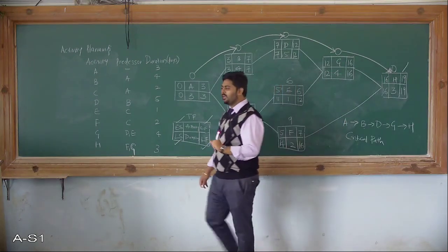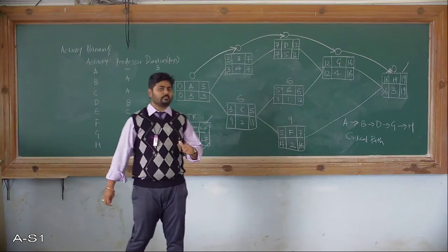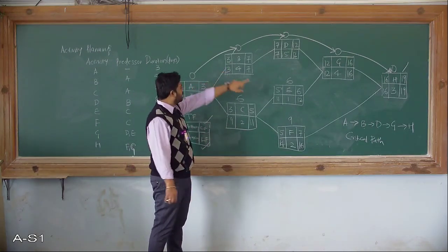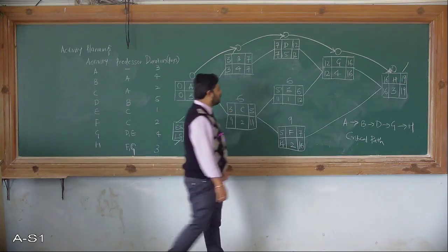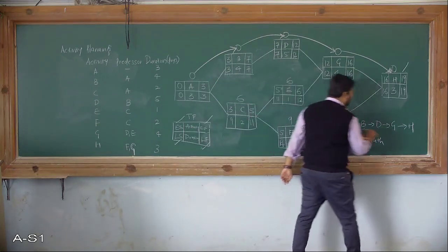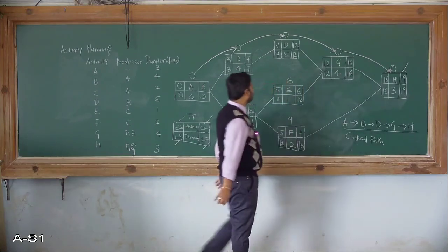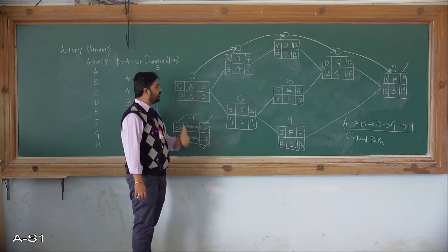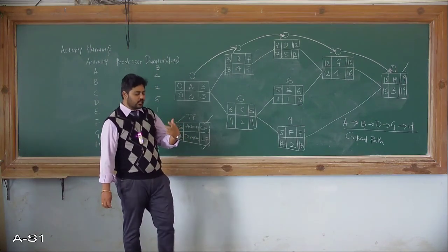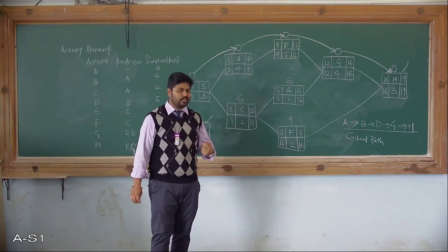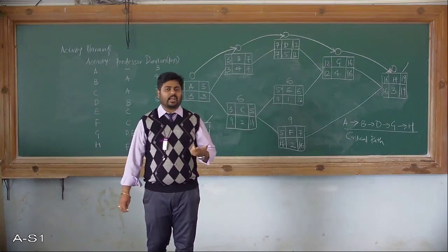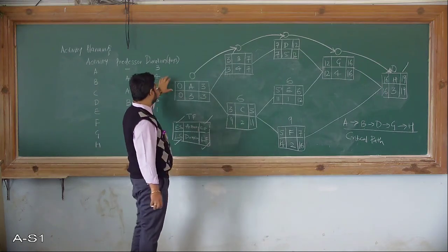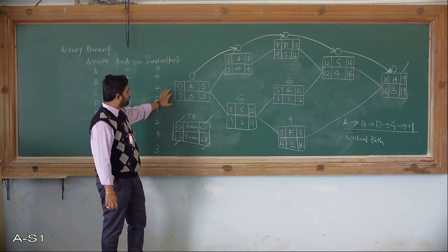So that is nothing but a critical path. The nodes which form that particular path can be identified as your critical path. Before identifying the critical path, first you need to list out the different activities involved. Then you are going to identify the early start and early finish, and late start and late finish for each activity.